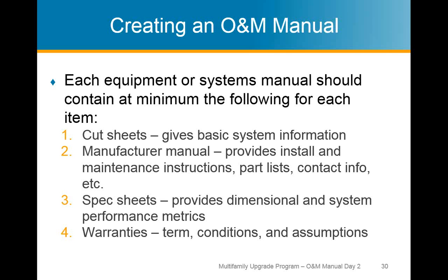They're more technical would be the broader way to define that. And then warranties. What's our expectation for a manufacturer's warranty on a given piece of equipment? We need to know that. It needs to be documented here. It needs to be easy to find, so we're never in doubt about whether a particular piece of broken or malfunctioning equipment is in or out of its warranty. It needs to be readily available.